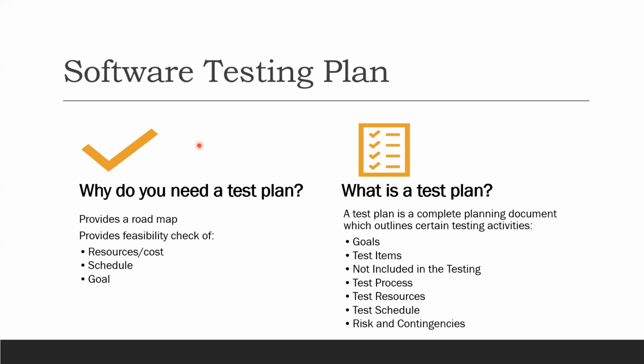So now the team has to create another build, meaning they have to check in new code again into the application. And once they check in this new code, it has to be migrated to the environment where you're going to be testing. Now, this data that you previously created is lost. So that is another risk, right?